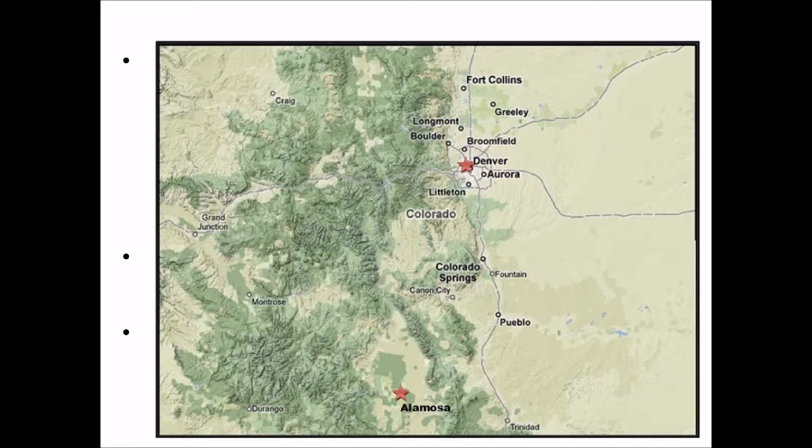The goal of root cause analysis is to move from the superficial proximate causes to system-level root causes by repeatedly asking why each identified problem occurred. If you look at the textbooks, some say it's as easy as asking why 5 times. Every time someone says something, you ask why again. But in fact, I think it's more complex than that, and we'll give some examples to show how it can be done.